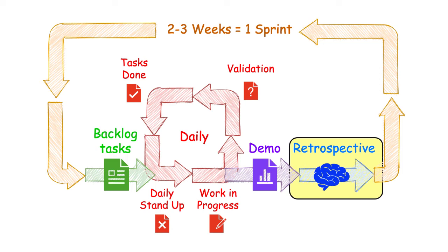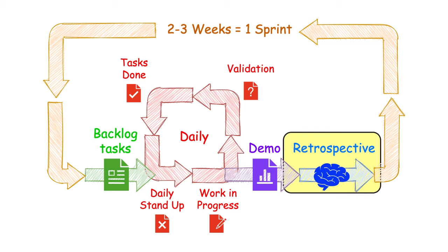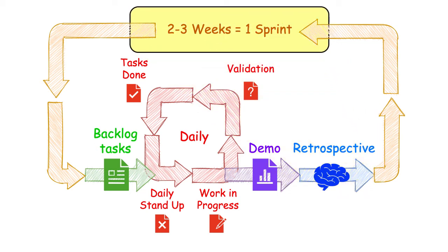So after the retrospective, essentially we do a planning for the next sprint, and we go back to the beginning. We populate the backlog for the next task. That's often done in the classroom by the professor, but it can be guided by what the students found they were having difficulty with. So in this sense, the class can adjust itself midstream during the semester in order to either add other topics or go into some topics in more detail, because in the last sprint there were some deficiencies that were shown. And the entire semester will have about 4 to 5 sprints